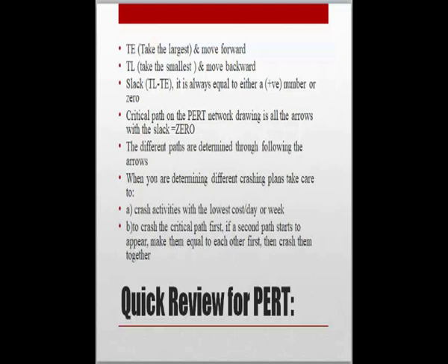As we have done quickly by eye, we looked at all the arrows where the events had a slack variable, a triangle with a 0 inside it. The critical path is the longest path, or the longest allowable time for the project, and it's also the project time.